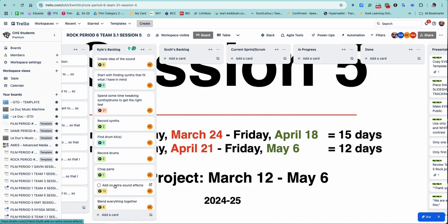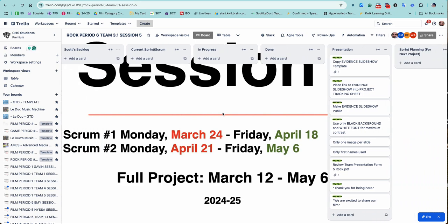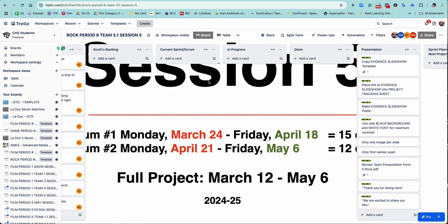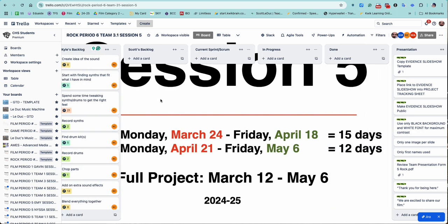If it's all these things, great. If not, leave some back here. Then each day you move into in progress, the things that you're working on. Each day you also put into the done column things that got done from the day before. If it's taking more than one day, you just keep it in there until it's done, put it over here. But all 3 people will talk to each other and move things, but basically you're having a conversation.